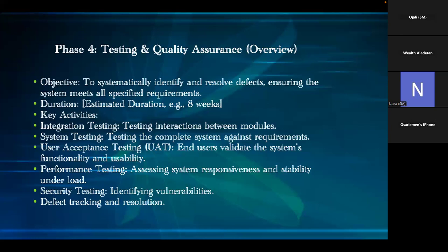That's all. Okay. And if there is any issue or any blockers, then you can elaborate more on it. Yes, because any issue that will stop the project will be part of your progress report. You will state what the issue is and then what is being done about it at the moment. How is it being managed? Has it been closed out? If it has not been closed out, then what's happening currently? This is the state, so that's what they want to know.